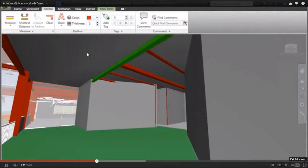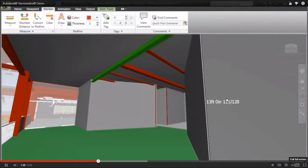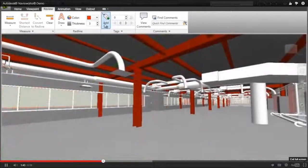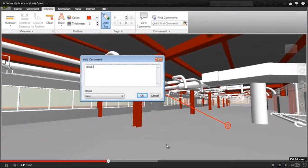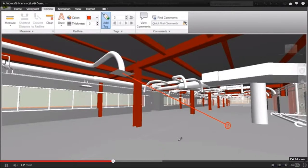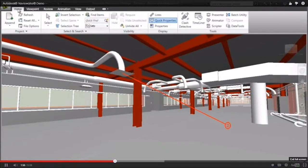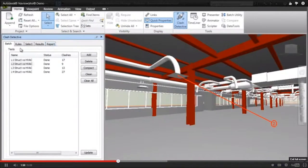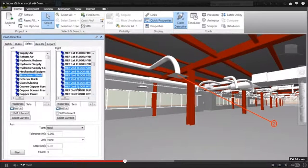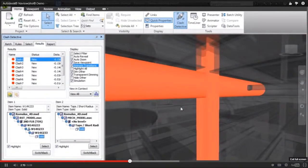Accurate measurements can be taken directly from the model during review or in the field. Markup tools enable collaborative review and communication across distributed project teams. Navisworks further delivers powerful analysis tools, including clash and interference analysis, management, and reporting tools that enable users to find and address coordination issues virtually before getting to site, which can generate an enormous return on investment.